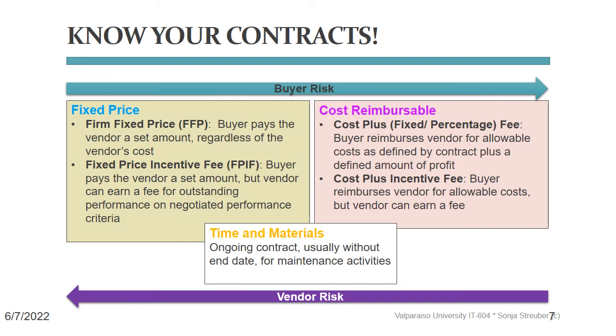While a contract structure like this allows your vendor to do their best work and to do it at their pace, one of the ways you can control their performance period is again with an incentive fee that will be paid only upon timely delivery or great testing or whatever delivery criteria you specify in the contract. Those are the two big contract types here. Do you see now why it's a good idea to have a lawyer look this over?